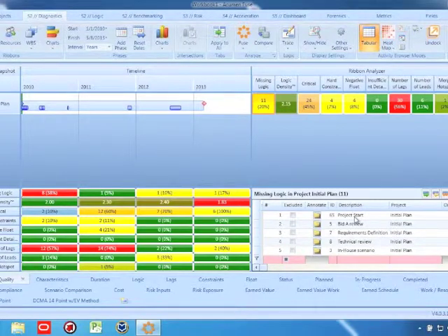Project start, that's good, I expect that. But these other ones that don't say project start or project finish, I've got some work to do, and I want to take care of those before I send this file over to the government. Now, what does take care of it mean? It doesn't mean just go into my scheduling tool and start making some connections. It means going through the management exercise with the control account manager or other responsible individual and linking the tasks in a way that makes logical sense.